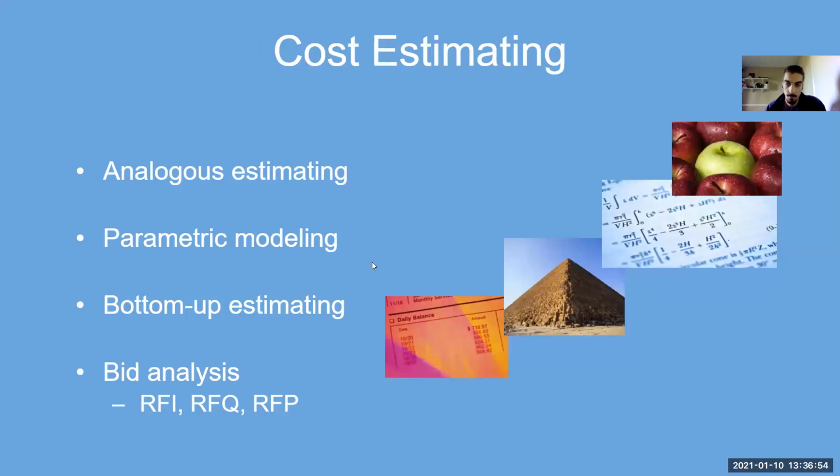How to estimate costs are different ways. We gave an example by analogy. I painted this room 2 years ago. It took me 4 hours. The other room is a little bigger, so I think it'll take 4.5 by analogy.